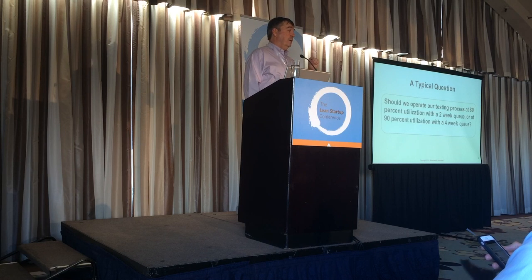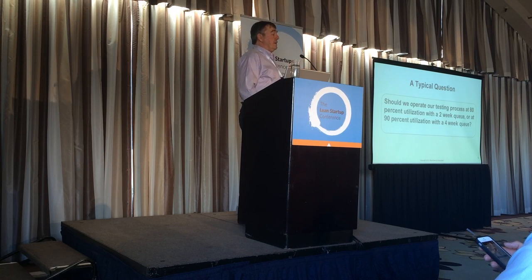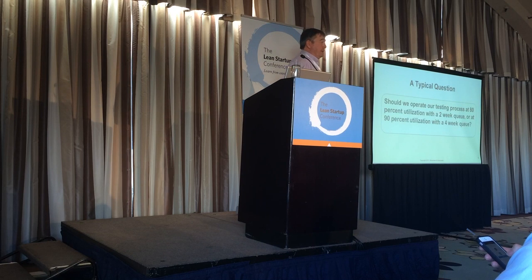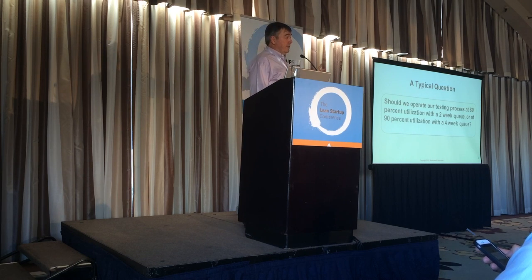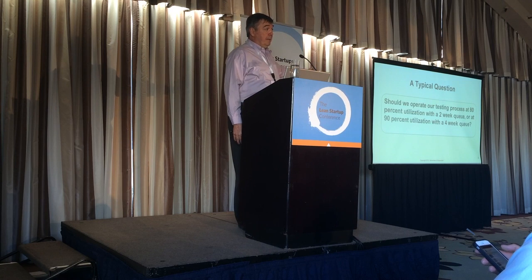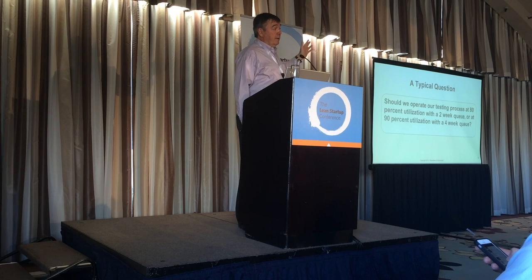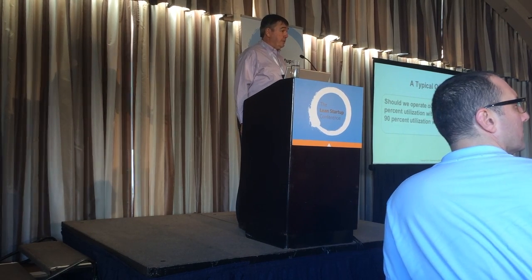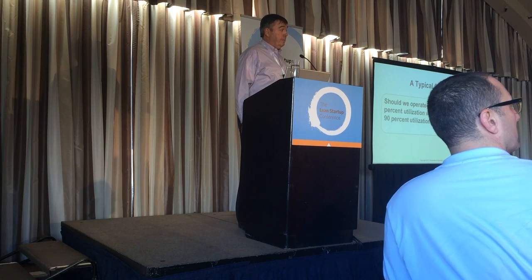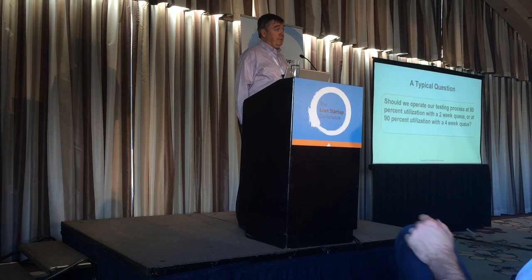That is a domain-specific conclusion. He was saying that time is intrinsically more expensive, and that's a very domain-specific conclusion. The reality is that you have insufficient information. You're trying to compare 2 weeks of cycle time with 10 percentage points of utilization. They are expressed in different units of measure. You cannot compare them until you get them into the same unit of measure.